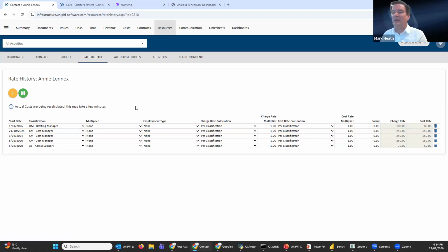And it won't update the information, it's transactional. So we know it was 250 before, it's now 100. So when we go to raise our next invoice, it'll say that we're giving you back money in this instance and why, and it'll distill that out to the end client. And so both from an actuals perspective and a forecast perspective, this is managing all of that on a transactional basis. So there's full audit history of that.